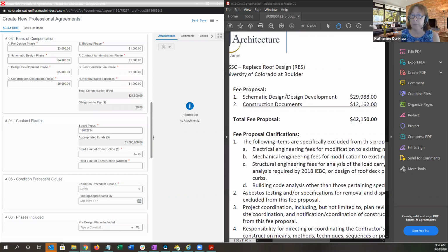You need to move your budget numbers as well. If you've baselined your budget, you will need to do a budget transfer. Yeah, those are so important. Maybe we have to re-review some of those processes because of the overlap, but that is key to really understanding the agreements.